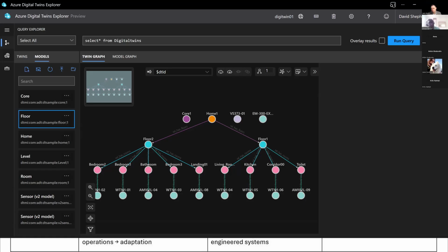But I agree with you. I mean, here's an example. I have seen situations where you have a commissioning agent, so they're the ones who are running the functional tests on the different systems, air handling units, chillers, boilers and that sort of thing. And when you say, okay, so are you ready? Have you got the reports? You see a PDF with handwriting on it. And what's my point here? My point here is the baby steps, digitization.